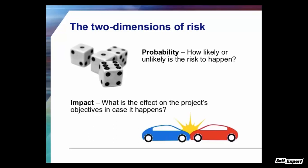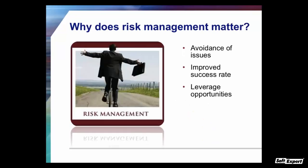Why does all of this matter? We care about risk management because it's about avoiding issues later in your project. For instance, if we're using untested technology, there's a risk we might be late due to unforeseen work. If we do nothing about it, it could turn into an issue and delay the project. But if you do something about it, you can prevent it from happening. On projects, there are lots of issues all the time — scope creep, team disharmony, defects — very likely as a result of not having looked at what could go wrong and not having mitigated risks in advance.